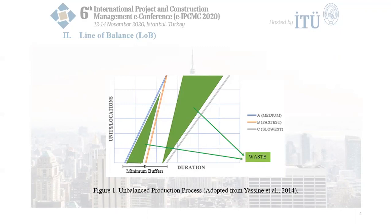Precedence relationships and time intervals must be evaluated to allocate resources between activities, as shown in Figure 1. Increasing the number of crews is the most effective solution to keep cost constant and accelerate production. The maximum productivity can be achieved by using multipliers of the major rhythm of production rates. Interrelating time and space-dependent activities, sharing the same crew or equipment for more than one activity, altering LOB activity criticalness, and generating LOB float might result in better efficiency. In LOB analysis, precedence relationships between activities are used, but the production rate is the major parameter for criticalness.